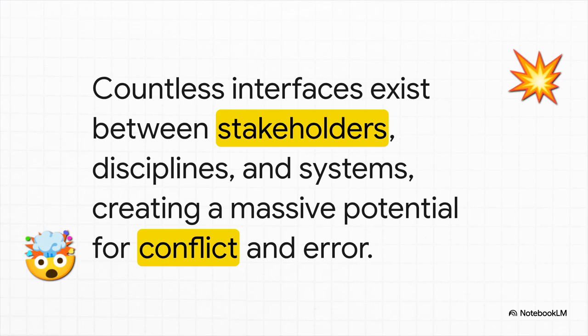And when I say interfaces, I mean literally every single handoff. Think about it. It's the moment a design document gets passed from the architects to the engineers. It's the physical spot where one contractor's pipe has to connect to another's. It's even in the fine print of the contracts between different companies. Every single one of those is an interface. And yeah, every single one of them is a potential landmine.